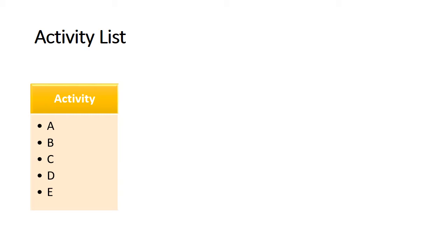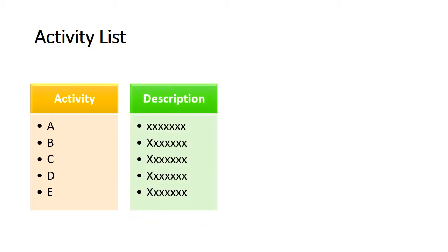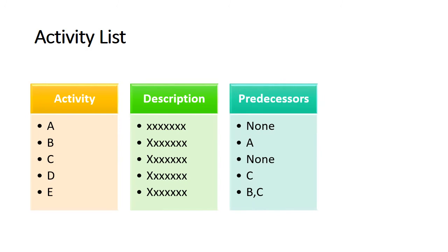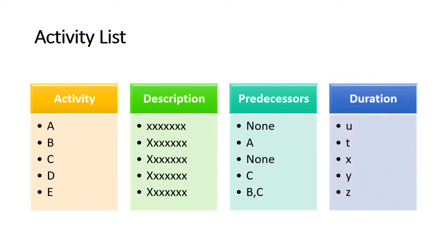Next you want to define the activity attributes. Here's where the description of each activity is kept. It includes all the information you need to figure out the order of the work. Any predecessor activities, successor activities, or constraints should be listed in the attributes along with descriptions and any other information about resources or time that you need for planning.